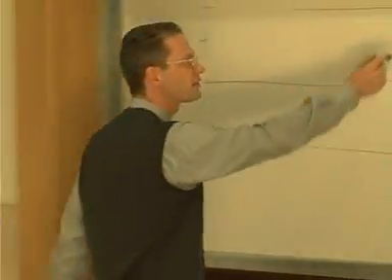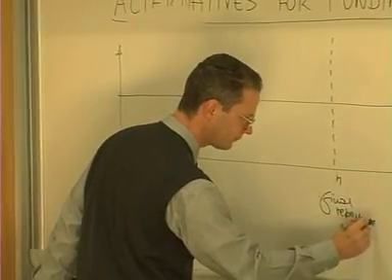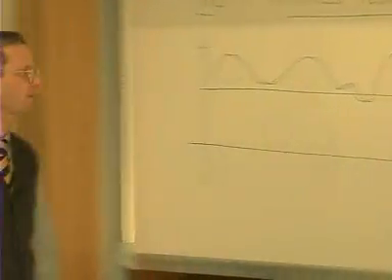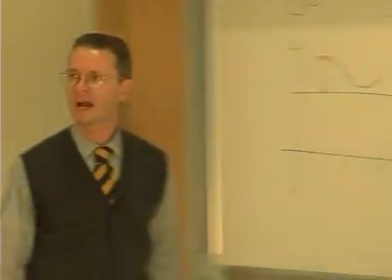Suppose that your project during the life of the loan, and supposing that N is the final repayment of the loan, shows a cash flow pattern of, let's say, this way. It is clear that a too rigid and excessively rigid repayment schedule is not suitable for project finance, because in some years, for example, this one and this one, or maybe this one, I have too much cash, and a good solution should be to repay a much larger amount of loan.